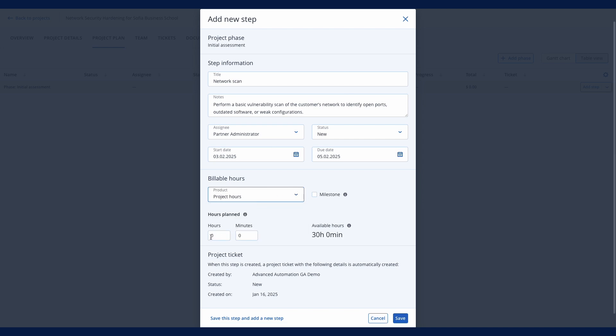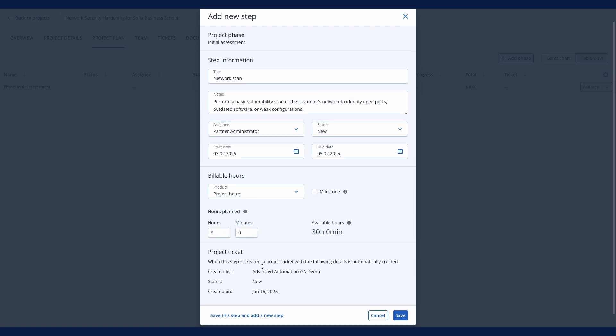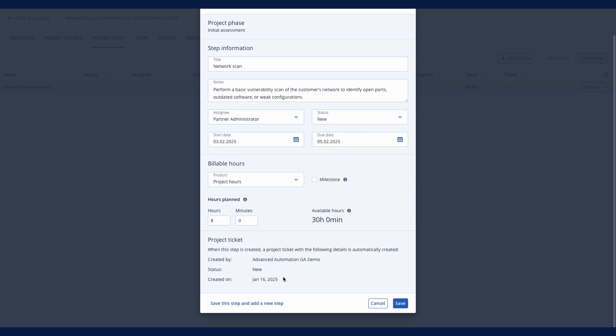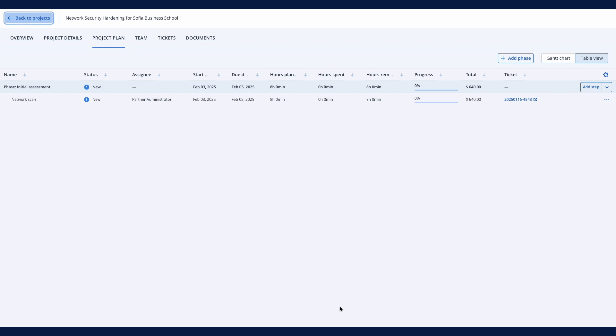The available hours field in Acronis PSA will indicate how many hours remain in the project budget for assignment. Optionally, you can mark the step as a milestone for per-milestone billing.